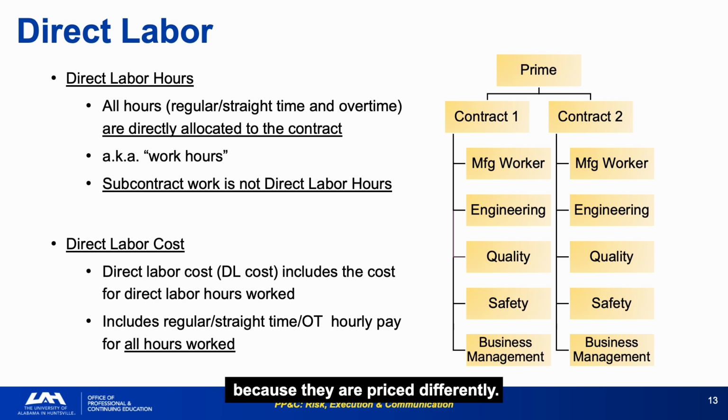Direct labor is typically the largest single cost element on a development contract. Everything else is either a rate applied to it or a separate line that grows in proportion to it. Direct labor is where 80% of your analytical effort should start. If direct labor is off, everything downstream of it will be off as well.